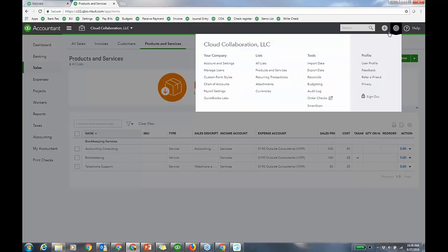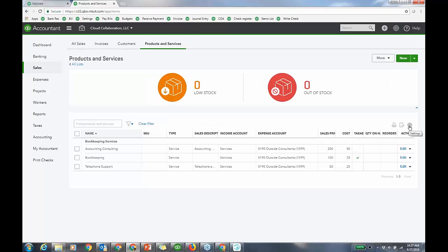Okay, so budget. Here's the workaround. Since there's no estimate to actual reporting within QBO Plus, but I've already set up the estimate, I take the estimate and open up the products and service list because I can add the expense account to it. I have to use that to figure out, okay, if it's 2 hours for each, the cost is $200 to me, and I'm anticipating $700 in revenue. So I'm budgeting that. It's going to cost me $200 on this particular job, and the revenue I'm budgeting is $700. Super simple example, all right?